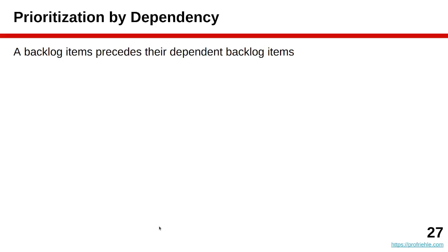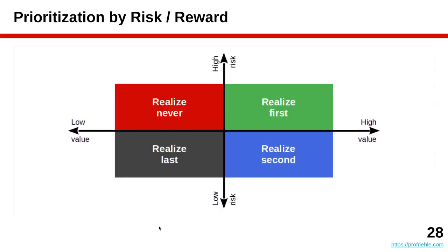As you prioritize backlog items now, there are a couple of different approaches. There's an obvious one. You can't do something that has dependencies or that has dependents, so other stuff that needs to be done beforehand. So you sort things by dependency. What is independent comes first. And then you also always focus on the value. What's most valuable should come first.